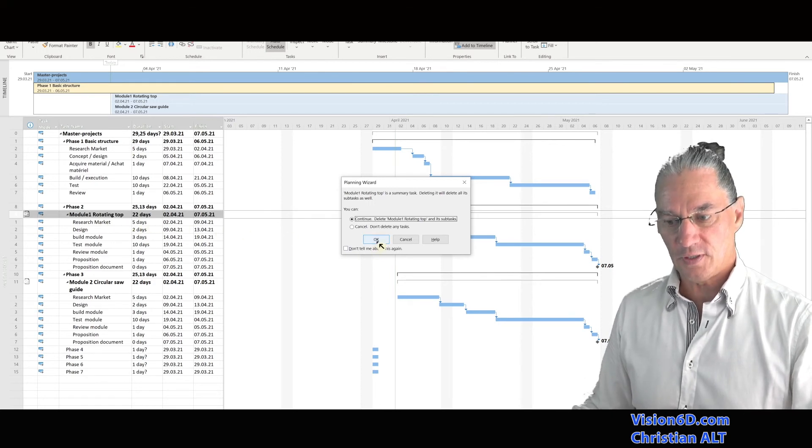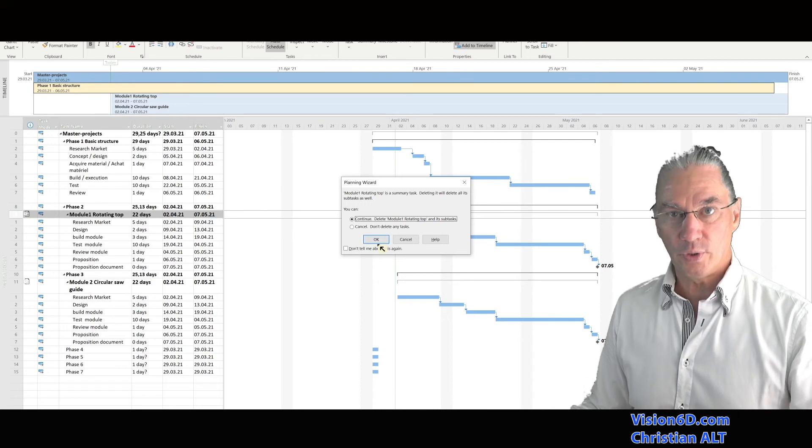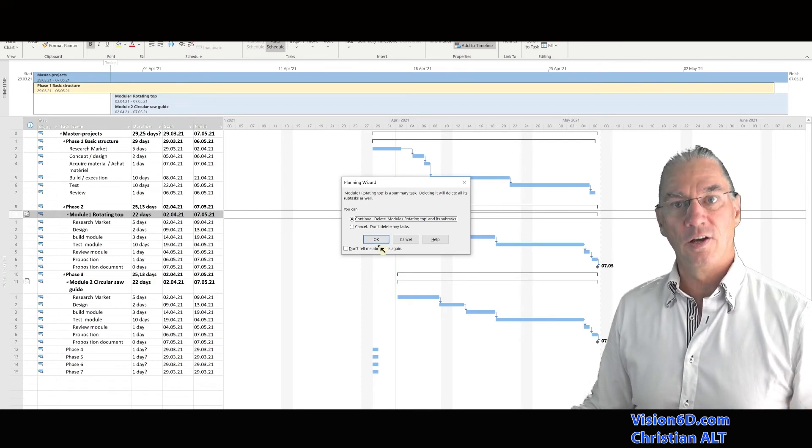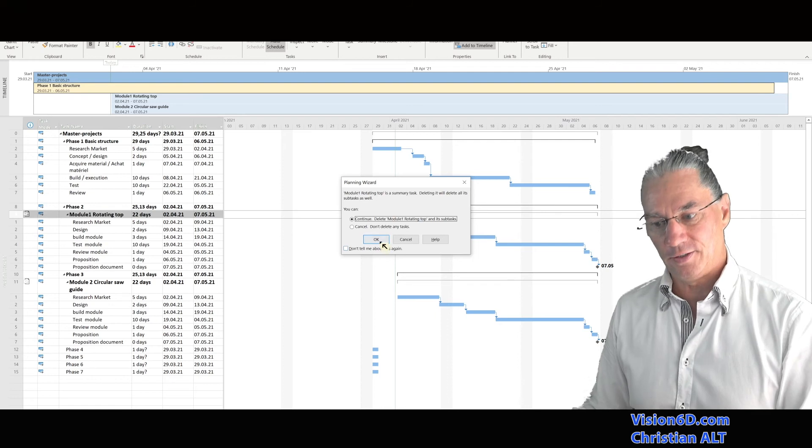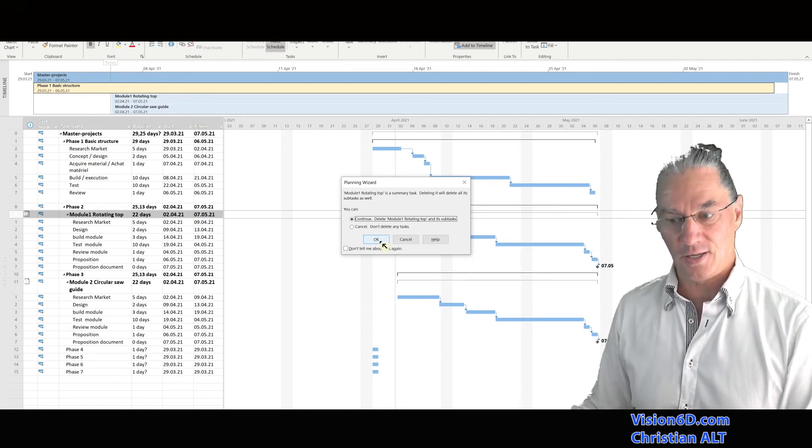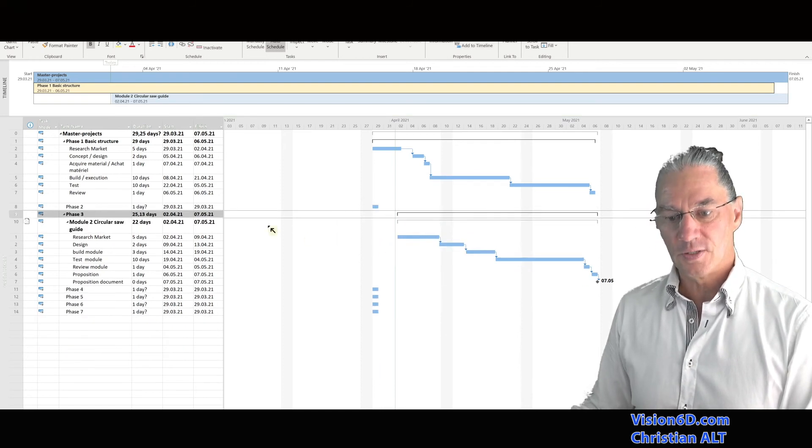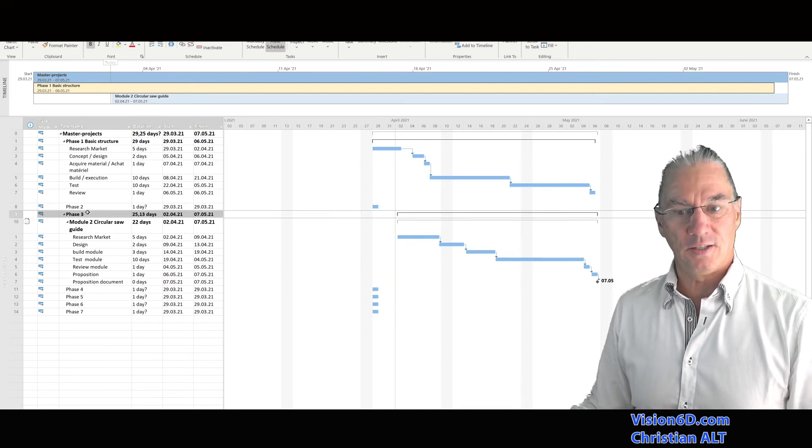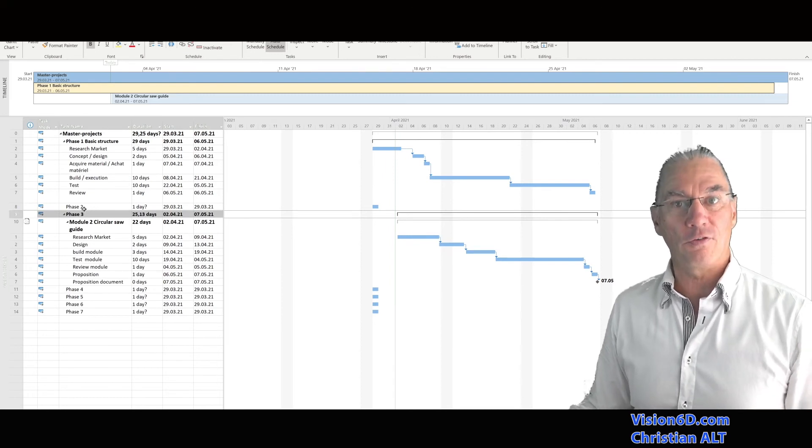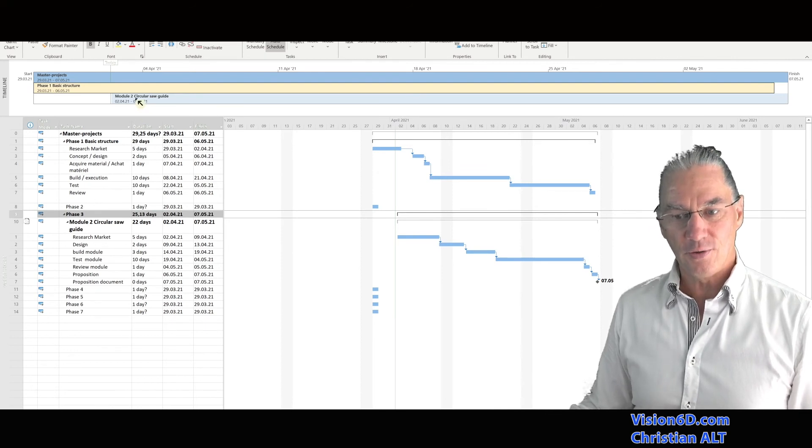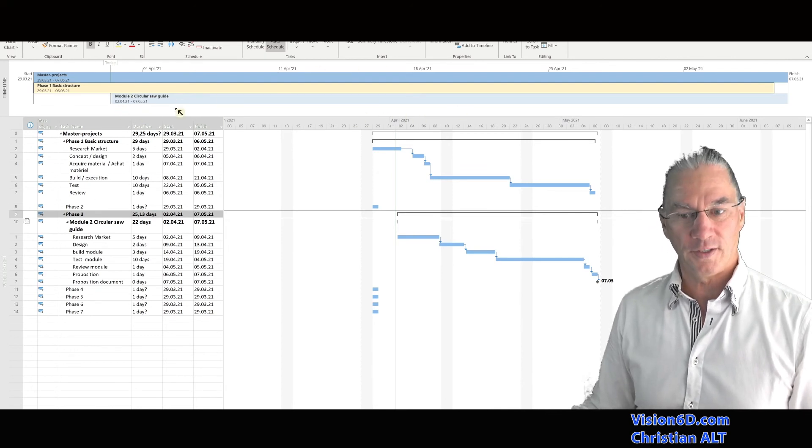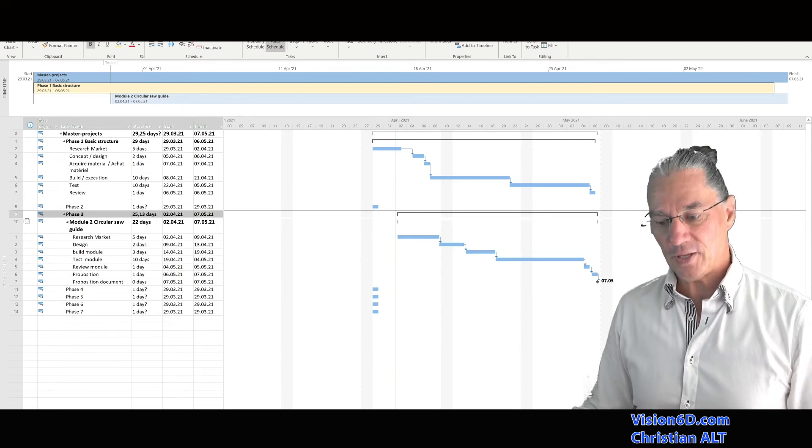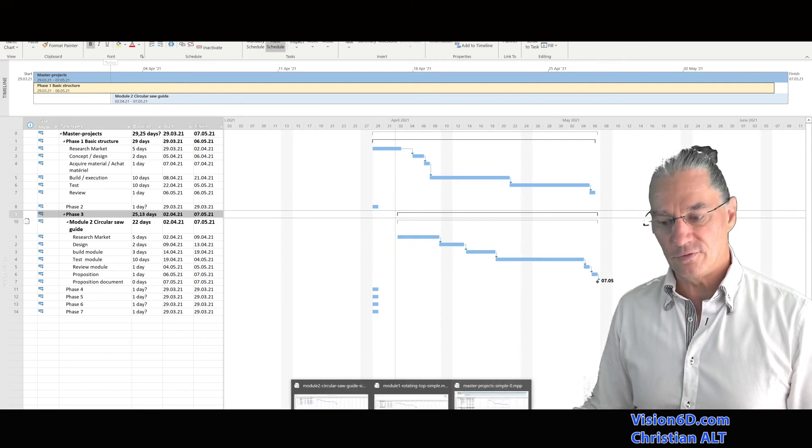Of course, it is what I want to say, but be reassured, it's not going to delete it from the module one file. So I can safely here say OK. So we see that we have phase one that is still here, which is part of the master project. We see that on the timeline module one disappeared. So now let's go and see what happened with the file module one.